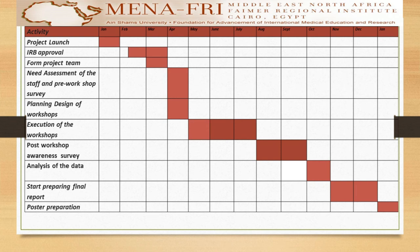The Gantt chart describes the execution of the project by time. I start by launching the project, then IRB approval, formulation of the team, need assessment of the staff, pre-workshop surveys, plan designing of the workshop, execution of the workshops, and post-workshop survey.